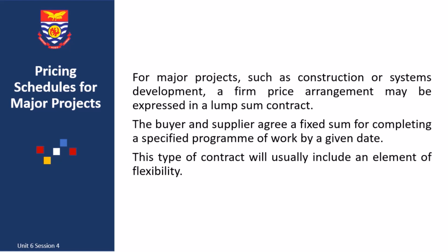The role and accuracy of specification is very vital in awarding lump sum contracts. As with other forms of firm price arrangements, a lump sum approach ensures a high degree of supplier motivation, but it can lead to quality or performance concerns, that is, if the supplier is forced to cut corners to reduce its exposure to cost blowout. In order to avoid this, the project manager will need to monitor the progress of the project carefully.